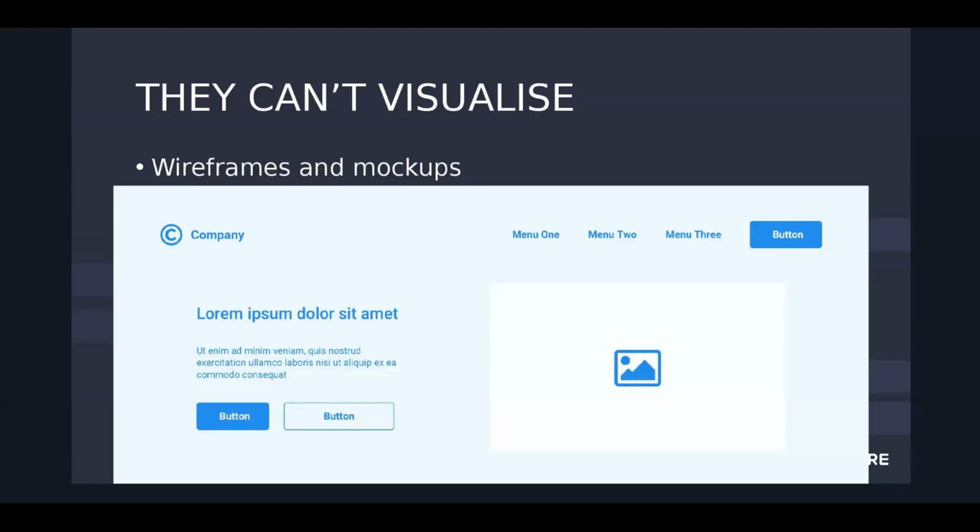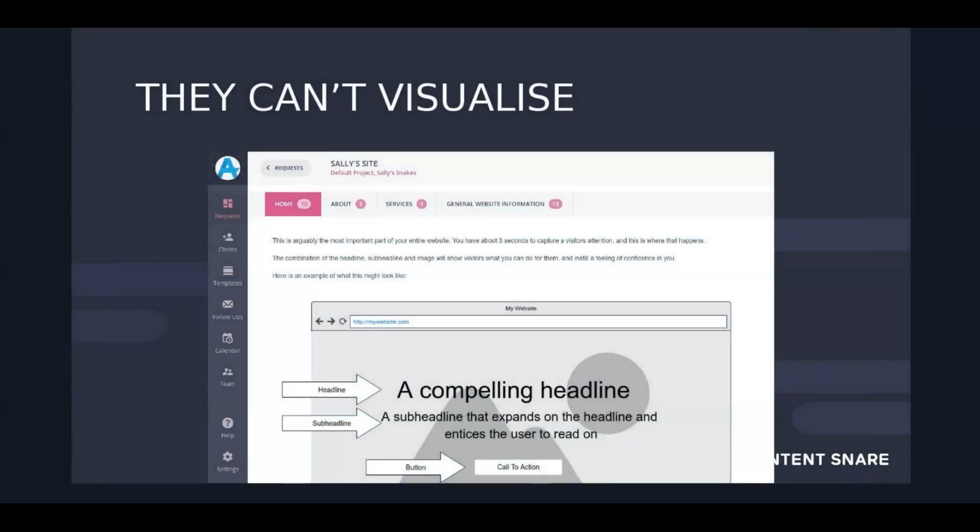If you think these guys are going to have this particular header, where there's an image on the right and some heading, text and buttons on the left, you send this to them as part of your content request and say, this is what the header is going to look like, and this is the text that we need to fit that. And that's what that next slide is all about. Going the next level, you can actually label that stuff and say, I need a headline, a subheadline, and a button text. And then you can have fields for that below, which we'll get into shortly.